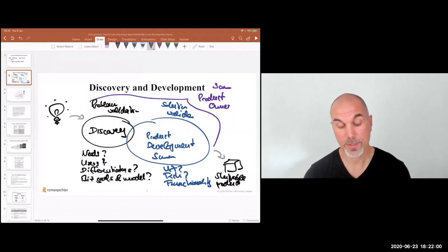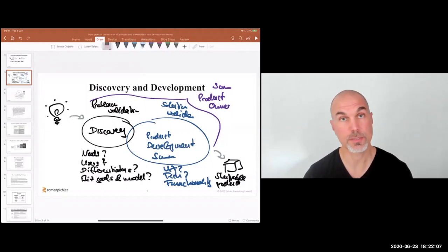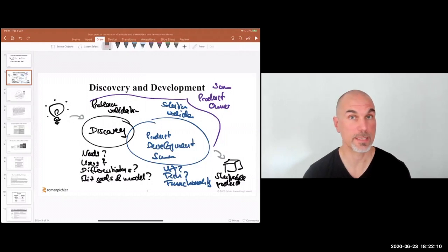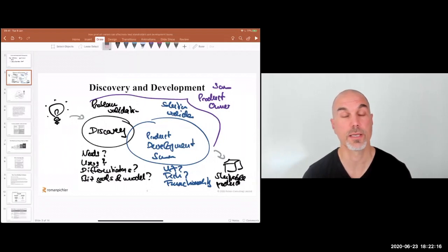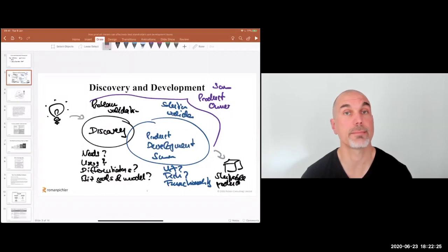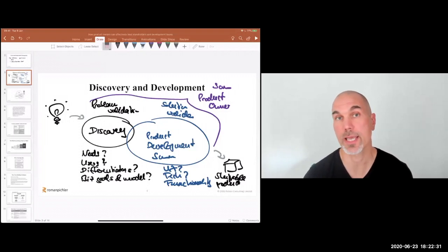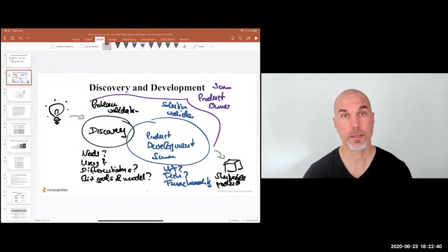For me, it's very helpful to involve stakeholders early and frequently. It starts by doing some discovery. I would suggest kicking off a time-boxed discovery piece of work by coming together and populating a product vision board — or you can use any tool you find helpful, like Ash Maurya's Lean Canvas or Alexander Osterwalder's Value Proposition Canvas. The important point is that you ask the right questions early on and consider doing it together with the stakeholders rather than on your own.